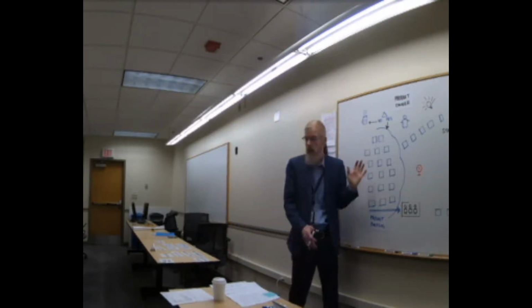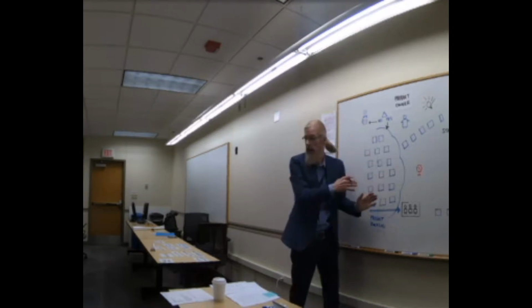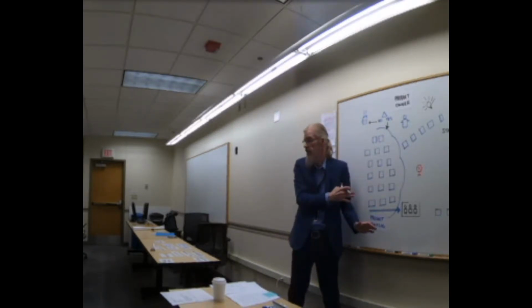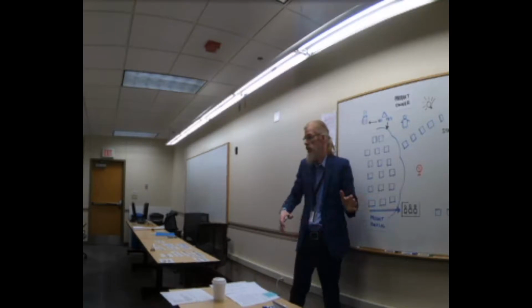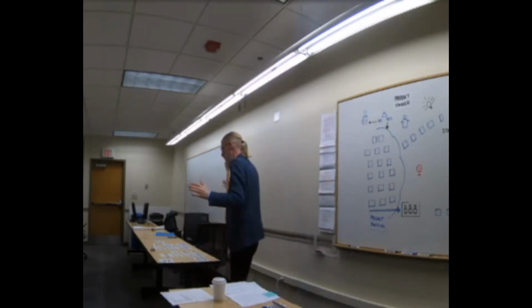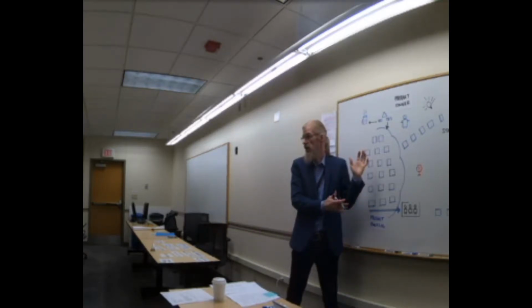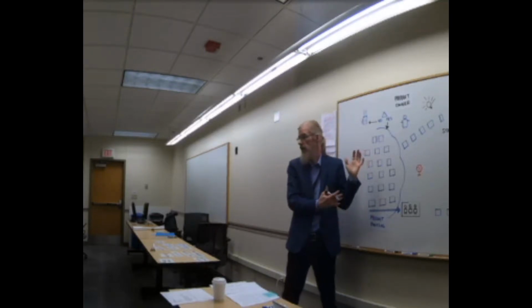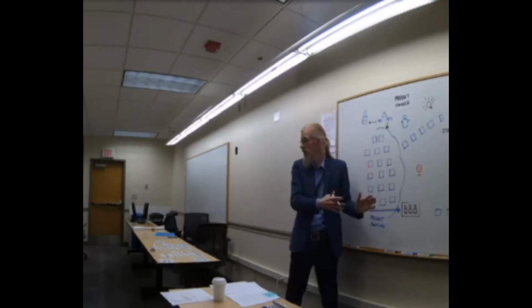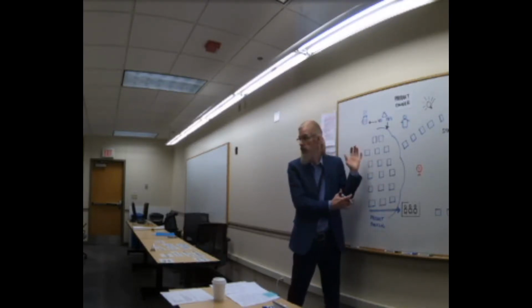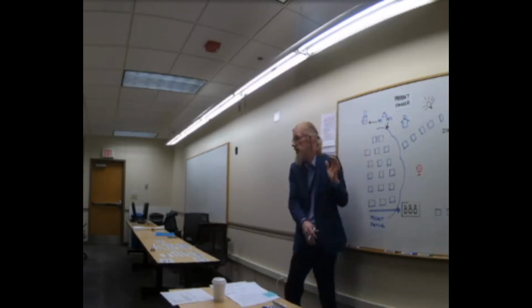Okay? Now, Dee mentioned we have this process called backlog refinement. This is done concurrently throughout our release, throughout the sprinting. Generally, my teams do this every week. I have 3 teams. They do this every single week on Wednesday at 1:30, okay, for a couple of hours. And this process is all about prioritizing, sorting, sequencing, sizing, sometimes splitting if these things are too big. It's refinement work that we do to improve this backlog. The backlog needs to be improved.